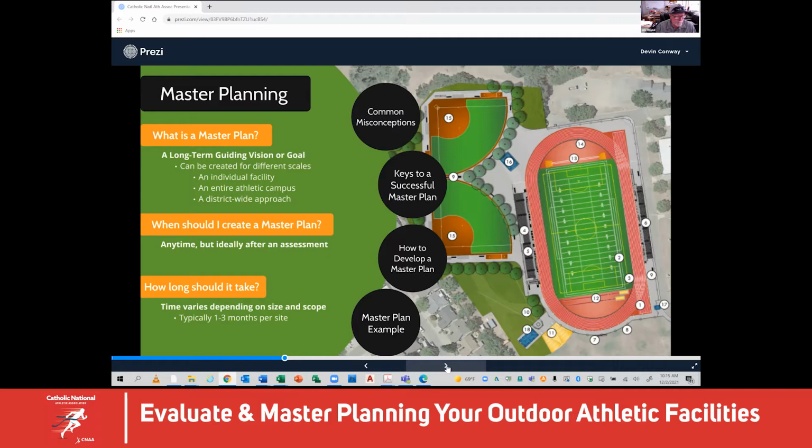So understandable. And then how long does this take? Depends on the complexity really of the engagement and how many meetings we're doing, to be honest. I mean, we've had master plans for whole campuses that we pound out in a very exhaustive way. It's maybe a month. But I would say typically to do an area such as this on the screen, it's usually 2 to 3 months.